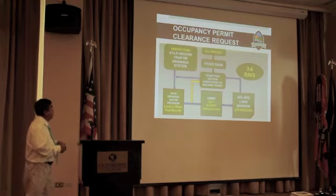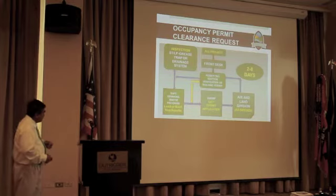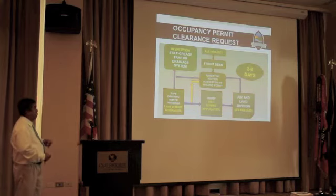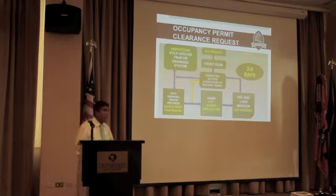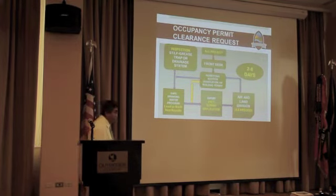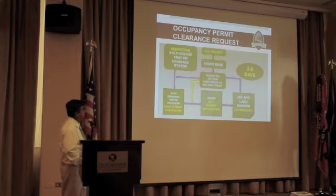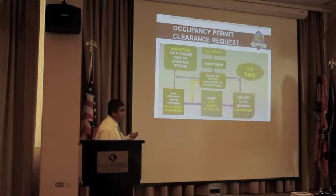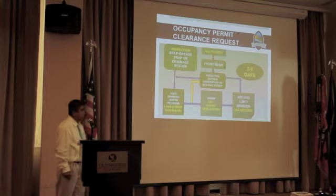So if not, then on the permitting side, again, there's another inspection, okay? We have inspections like the grease trap or septic leaching field. For the drinking water issue, this applies to almost all military projects: the lead or bacteria test result, that is under the Safe Drinking Water Act. And if you have a generator, we require you to submit your operating permit, generator permit. If you have a UST, you have to get that permit. And for solid waste, you have to show us that your solid waste was disposed in the right place. That's what we approve. So it requires about 2 to 8 days. Even though this is very short when it comes to the requirements, sometimes the requirements in here add up. So there's the whole thing in here to complete one project.